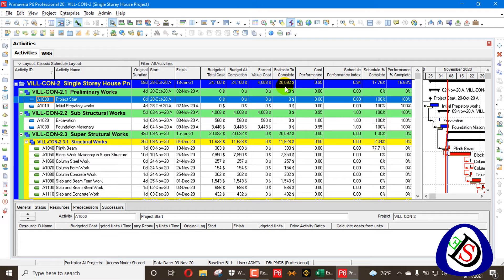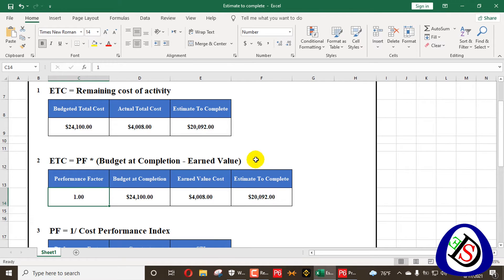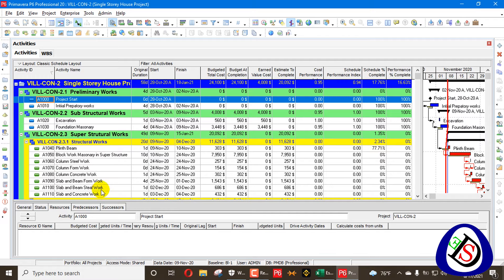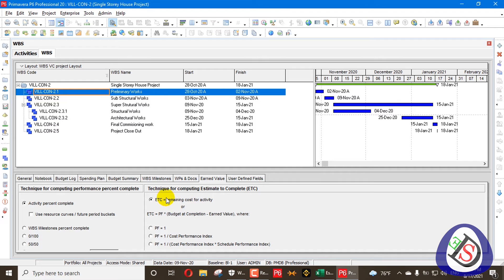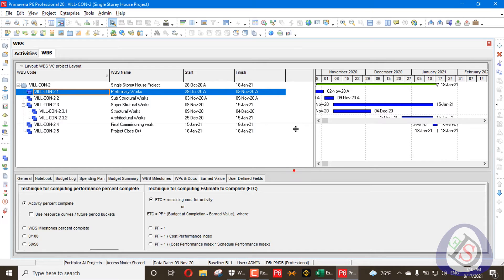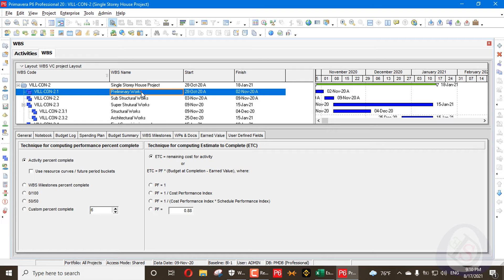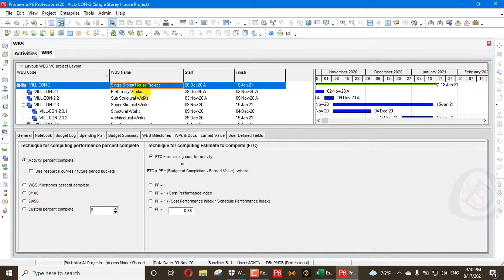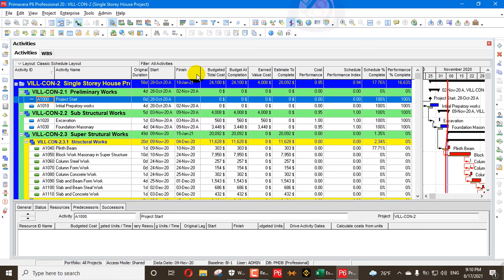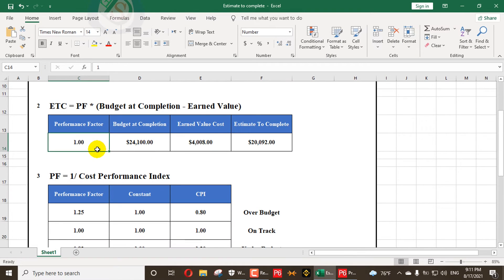You can see the value of $20,092 as the Estimate to Complete — that is $24,100 minus $4,008. This value, multiplied by the Performance Factor, appears in the WBS. I applied the technique setting at the top WBS level, so it cascades down to all sub-WBS levels. When PF equals 1, Option 1 (Remaining Cost) and Option 2 with PF=1 produce the same result — there is no difference.